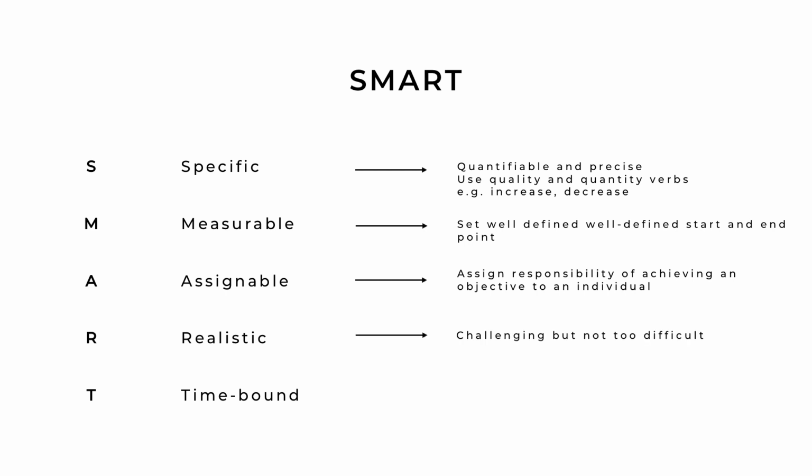Objectives need to be realistic. They can be ambitious, but not unrealistic to the point that they become demotivating. Increasing the amount of waste to be sorted per day from 2 to 4 tons is realistic if certain processes are adapted and new machinery is bought. Increasing from 2 to 10 tons is not realistic. A deadline, date or time when the objective will be accomplished or completed is necessary and must be included to make your objectives measurable. For example, you want to achieve the efficiency increase within 6 months.